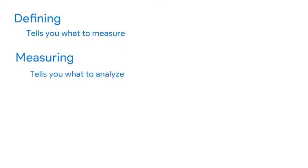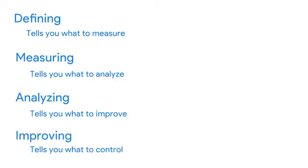To sum it all up, you can remember DMAIC like this: defining tells you what to measure, measuring tells you what to analyze, analyzing tells you what to improve, improving tells you what to control. Lean Six Sigma and the DMAIC approach are ideal when the project goal includes improving a current process to fix complex or high-risk problems, like improving sales conversions, or eliminating a bottleneck, which is when things get backed up during a process.